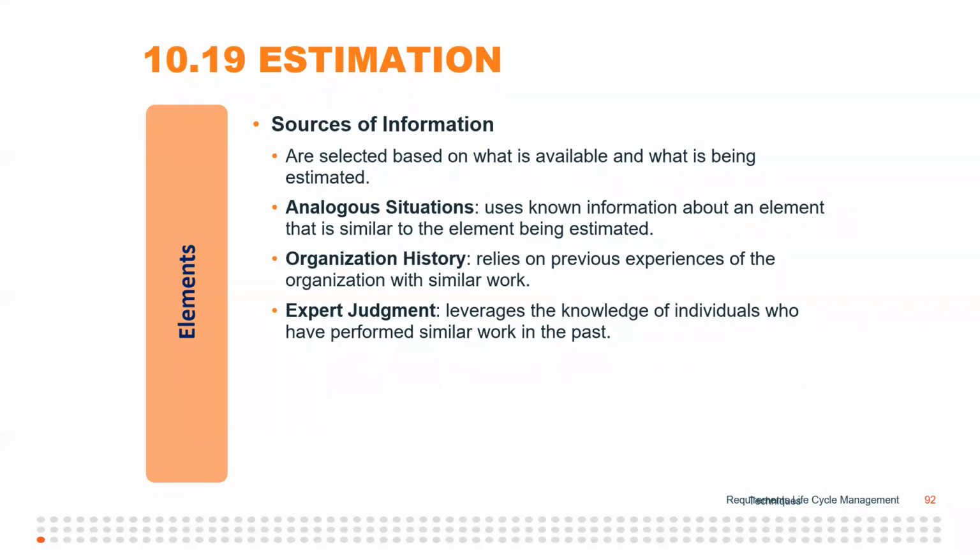So you can pretty much say, okay, at this point in time, this is analogous to when we implemented the financial modules. So yeah, I think we understand it. It's going to be very similar to that. So it's going to end up costing us $75,000 or whatever it was.